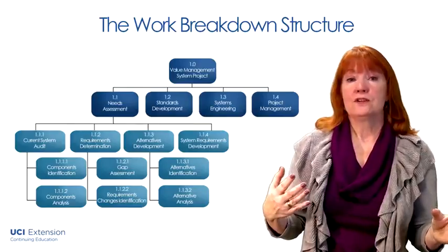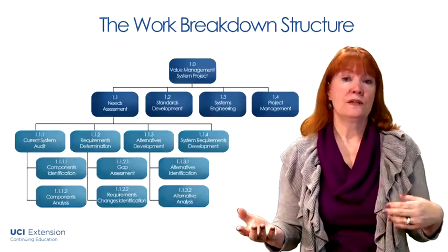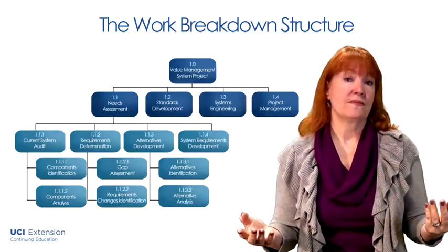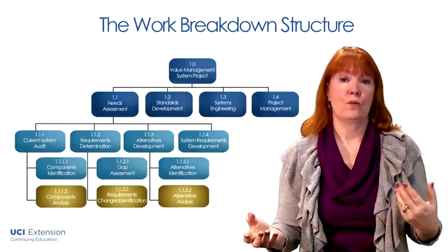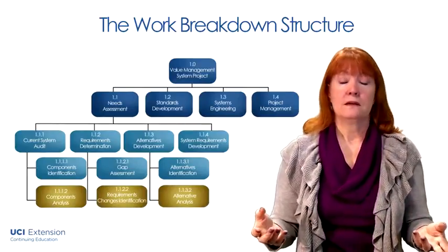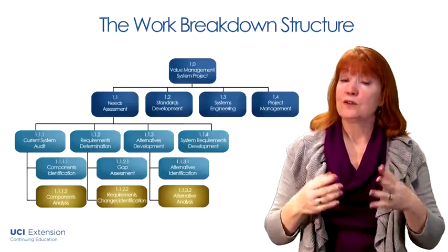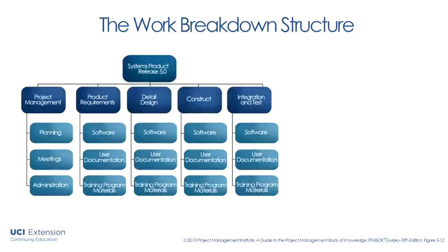In order to understand your project resource needs, you are going to revisit your work breakdown structure. It is possible that you stopped at a level which was detailed enough to know that the work to complete the scope was included, but perhaps not detailed enough to assign the work. Take another look at your work packages.